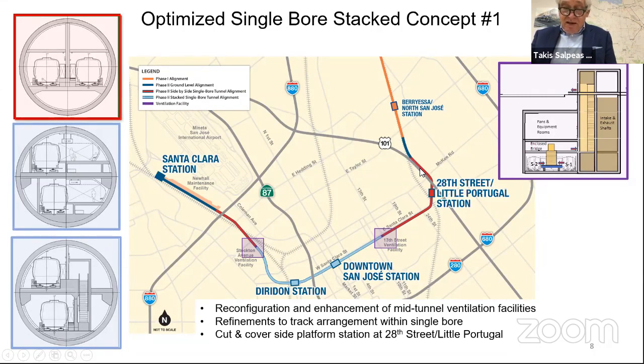You can see the red line, and please refer to your page, upper left. You can see the red picture on upper left. And we're gonna have the big tunnel with the side-by-side tracks coming down from Berryessa. Gonna come down something like 9,000 feet of railroad, and it will come to some place around the 13th Street, 14th Street ventilation structure I already talked to you about. At that point, what we have to do now, that's the reason we need the box, is to take the one track and put it above the other, the ramping.